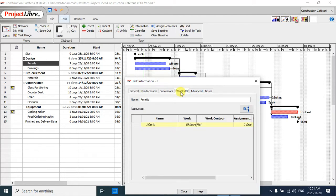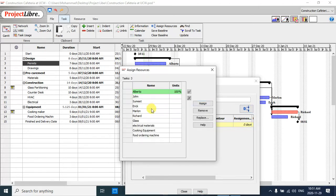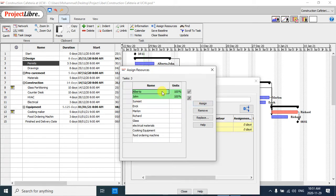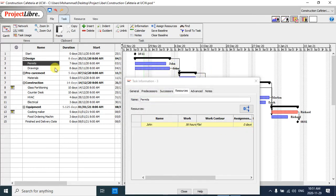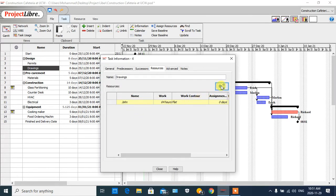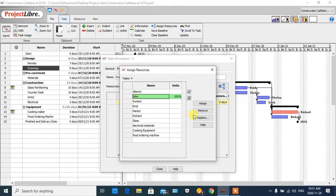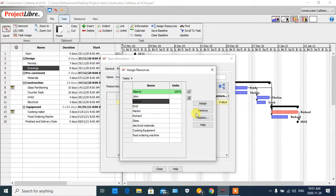As I defined before for the resource, if I double-click on, for example, the 'Permit' task and click on 'Resources,' I can see Alberto, who I had assigned before. I could add another person or change Alberto with another person — for example, I want to add John to this task and remove Alberto. In the drawing task, we can also remove John and assign Alberto to another task, such as 'Submit.'